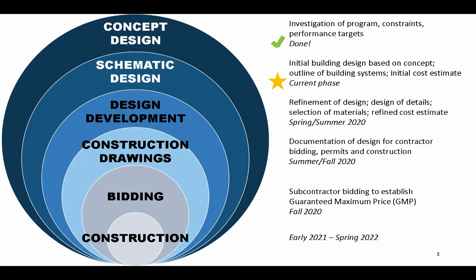The construction documents become an opportunity to make sure that the city and the building and permit team and the contractor and the subcontractors understand the building well enough for the different parts to do their job. So whether that's the city to approve the building as a buildable, safe building, or the contractor to say, I fully understand this building well enough to build it in the same way that the architect thinks it will be built. That's the purpose of that construction document phase.